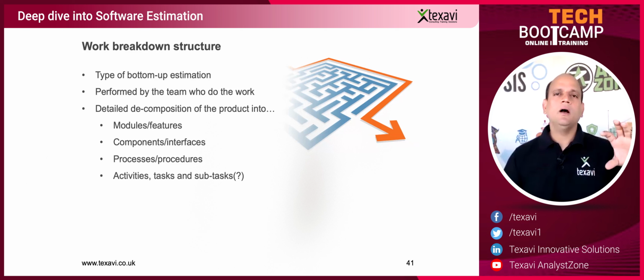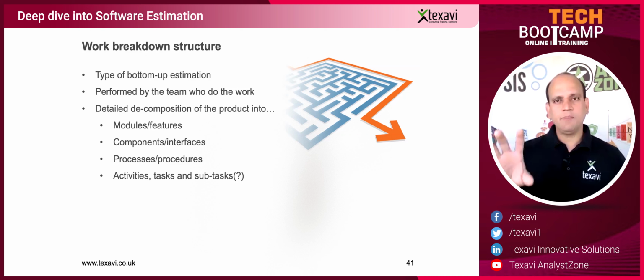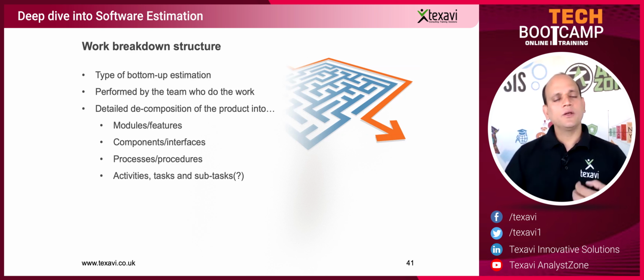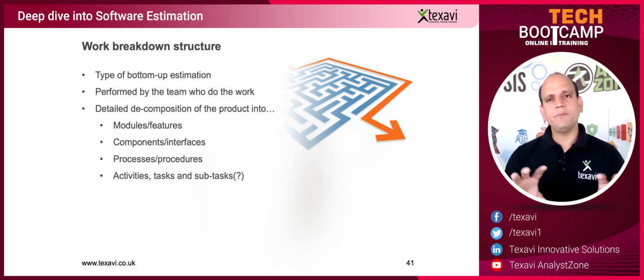In the context of the e-commerce website, the catalog of products itself could be one module. The administration or the CMS, which you use to upload or change the details of these products or items, could be another module. A third module could be the shopping cart. A fourth could be the payment processing. A fifth could be the order processing. And the sixth could be communication, the notifications of emails and stuff like that. Each of these could be broken down further into separate modules based on functionality.